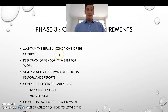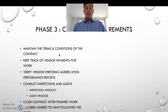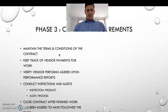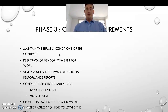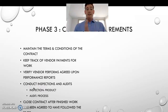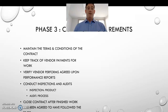Phase three: control procurements. Once the contract has been executed and work has started, the buyer has to make sure the terms and conditions are being maintained by both parties. You have to keep track of vendor payments, verify the vendor performs the agreed-upon work, get performance reports and status updates about milestones. You also conduct inspections and audits - the difference being that inspections are on the product and audits are on the process. Then you close the contract after finished work has been agreed to follow the terms and conditions.